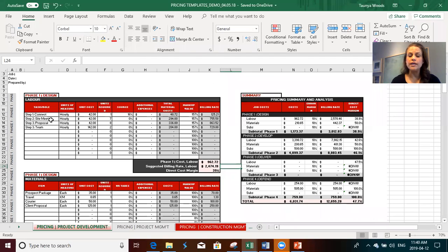Because all you have to do here we're just putting estimates. But let's say this is an example of a project, and this company, let's say her name is Mary, and now she says, oh, well, here's another project. And she realizes, okay, this project's going to be a little bit bigger. So we're actually going to need 9 site visits, and the connection call is actually going to be 2 hours for people, right? You can just adjust this so quickly. All you're really doing is your units down here are going to get adjusted, maybe with some other slight variances, but it calculates it all for you. It's very, very cool. So let me change those for you.